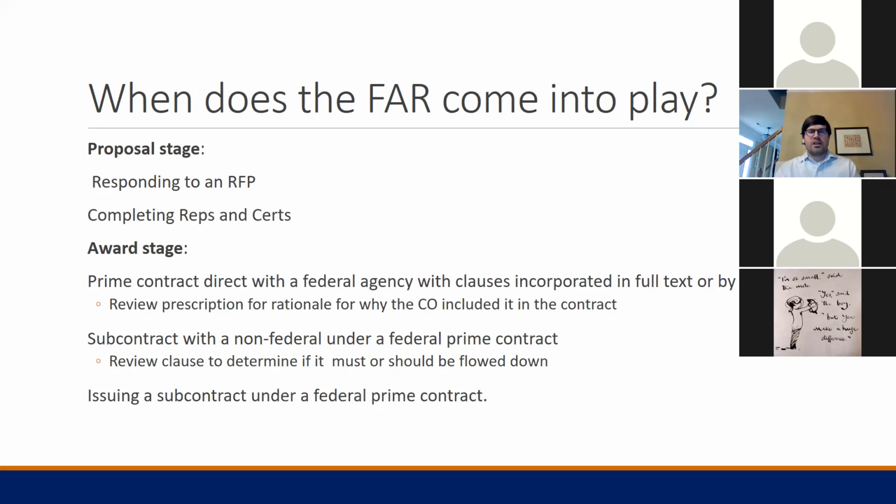So the key point when we're looking at whether something is applicable or not applicable at the award stage is that we're going to review the prescription, which is basically the rationale for why the contracting officer is going to include it in the contract.